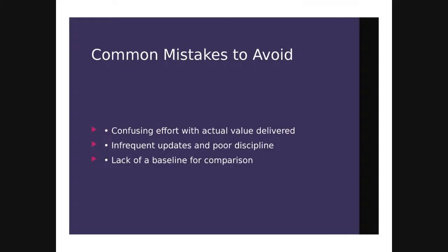And that's why we have earned value to actually look at the scope completed. So if you look at the scope completed and you only got 4 out of 10, then that's not your earned value. Your effort is, yeah, you put in 10 hours, but the value you got out is 4. You get what I'm saying?